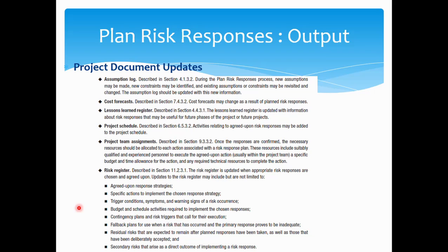Your team assignments, and the composition of the teams, might change depending on the risk response plan. Due to your risk response plan, maybe you need more cybersecurity experts in your team. So your team composition might change, as well as your risk register. After the risk response, definitely the risk register is going to change with the risk responses. So we are updating the risk register.